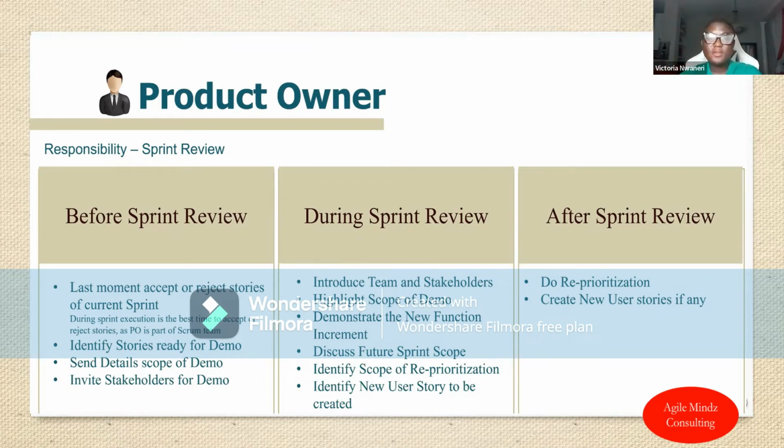So oftentimes the product owner will go through those columns to make sure that once again, each of those stories within those columns meet the definition of done and also has everything that the acceptance criteria has listed. And oftentimes they will also do UAT testing, just to see that the functionality is what the asks are.